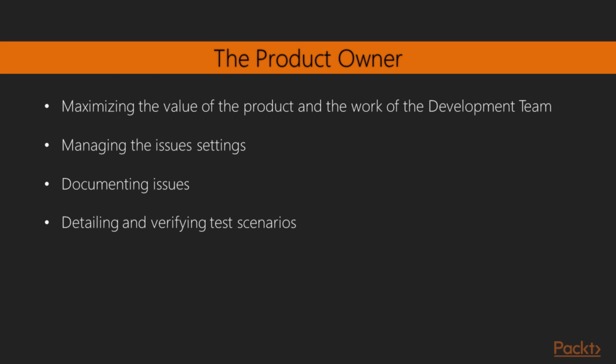In Agile software development, the way we document what we do is accomplished through user stories. A user story is the description, in the everyday or business language of the user, defining what a user does or needs to do as part of his or her job function. The wording used to describe a user story is based on the pattern: in order to, the value, the benefit we want to bring to the user or customer; as a, who gains the benefit, the specific user, customer, or role we focus on; I want to, the hypothesis, the functionality we assume will provide the value to the user.